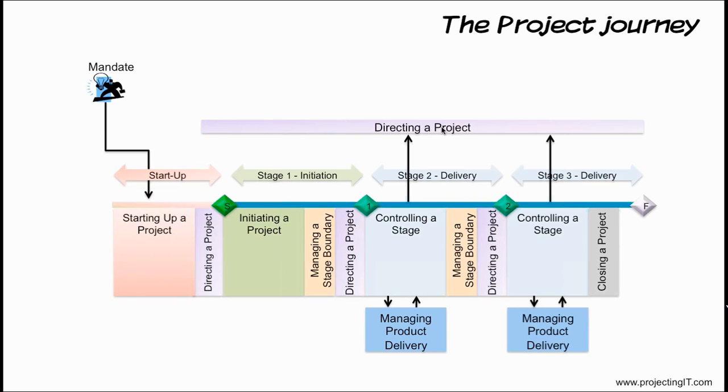This includes obtaining sign-offs, updating the project plan, ensuring all items defined in the scope are completed, notifying the company about releasing the resources, handing over the products, handing over the knowledge to the operations team, transferring ownership to the operations team, and also handing over the benefits review plan.